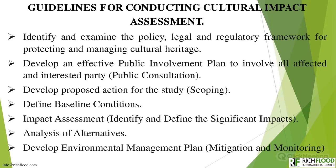Once impacts have been identified and defined, the next step is analyzing alternatives. This is important because the most important single strategy that can enhance heritage protection is complete avoidance — looking at site avoidance, that is, redirecting activities so that they do not endanger a site. This is particularly relevant in planning projects like dams, large-scale irrigation or drainage projects, urban infrastructure like road construction or housing. If sites cannot be avoided, the assessor should consider designing a workable alternative for the project.